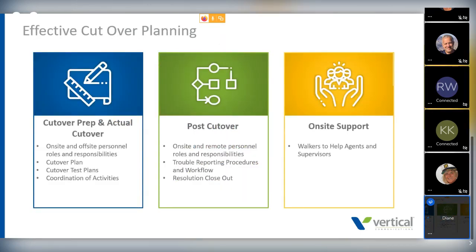All right. So we've done the training, we've done the design, we've done everything we possibly can to make this work. Now we've got to look very carefully at cutover planning. Don't miss this step. Get all the right parties involved. We talk about a bunch of stakeholders here. Let's make sure that the appropriate, relevant stakeholders are included in that cutover plan. Get the right plan, get the right resources, and ensure that roles and responsibilities are perfectly clear.